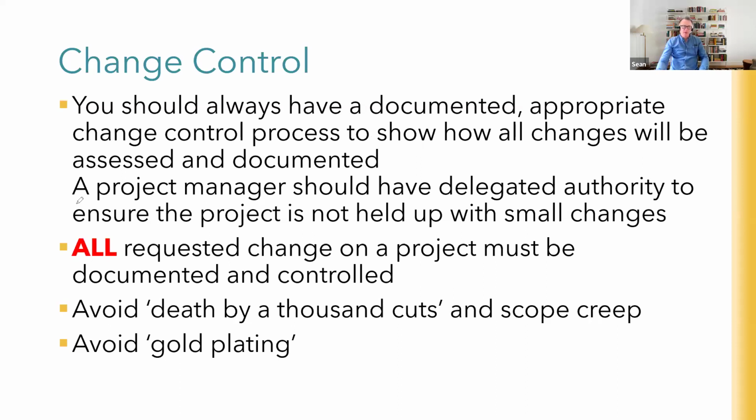And what's really important is a project manager should have a delegated authority, an appropriate level of delegated authority, to make sure that projects aren't held up with small changes. I've certainly seen instances where project managers have no delegated authority, which means that every change needs to go to some sort of change control board or steering committee or steering group. And that's just not effective. It's not efficient use of anybody's time as well.